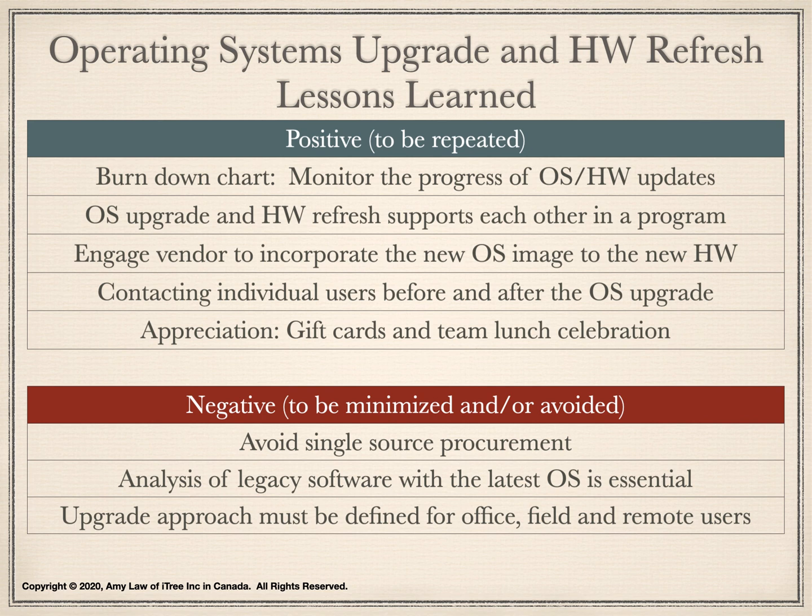The single source procurement is different from the sole source procurement. A single source procurement can be defined as 2 or more vendors can supply the commodity, technology, and/or perform the services required, but the company selects only one vendor over the others. A sole source procurement can be defined as any contract entered into without a competitor.